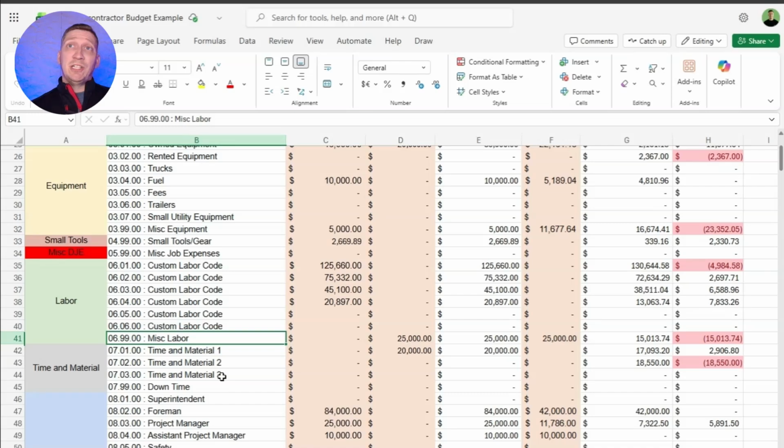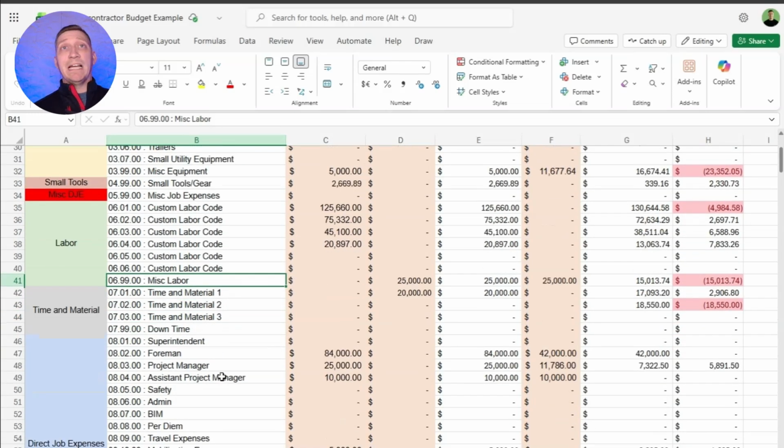Moving on to the next section, I always put in line items for time and material and downtime. We always want to track when the GC told us to come out and we stood around and wasted time talking about safety stuff and somebody wasn't ready. I want to have a place I can go to a meeting, as a project manager or as an owner, and say, hey, you wasted $5,000 worth of labor. Here's my documentation. You're not going to hit me with a back charge, or you're going to reimburse me for this, or, different things, horse trading.